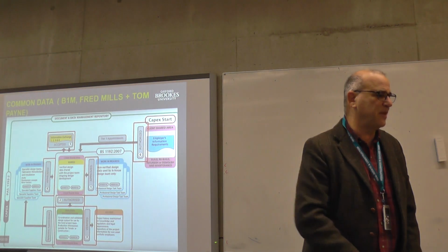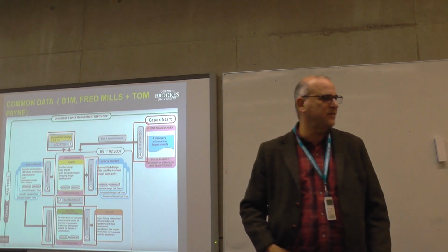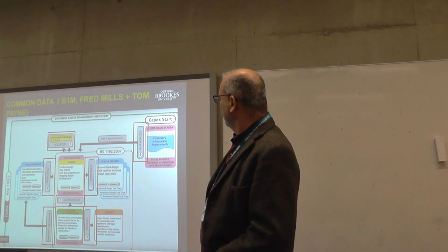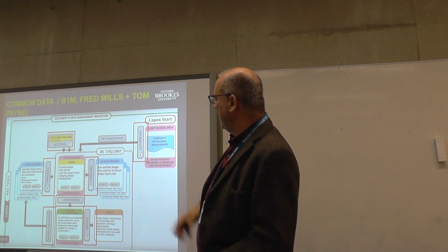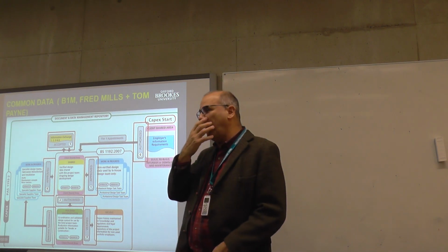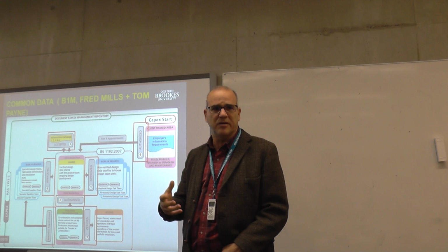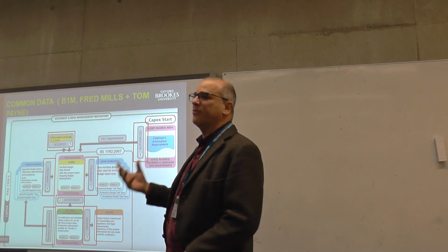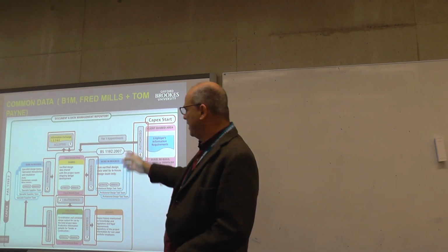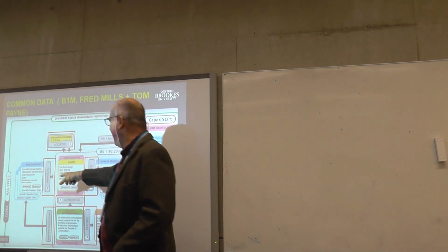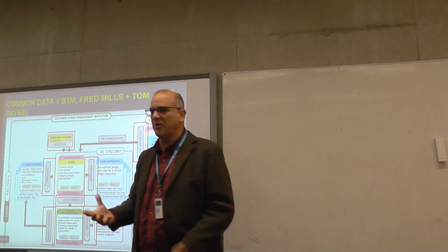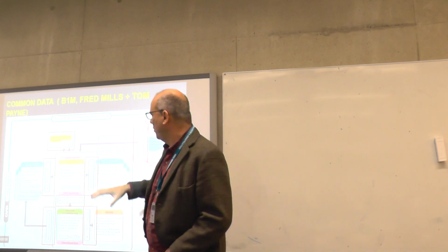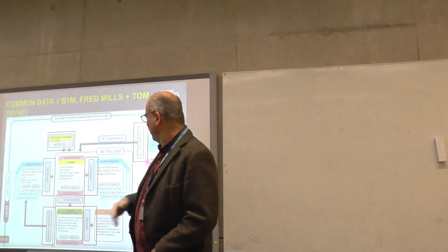I'll skip over this, but this is from the 1192. This is the top common data environment. This is from the 207. This shows the workflow about how various contributors submit tentative models or submit work in progress. And then that work in progress, so it's submitted over here, goes through an approval process before it's actually allowed to be integrated into the shared model.